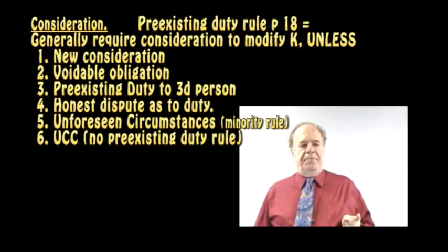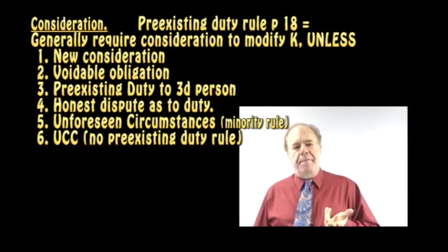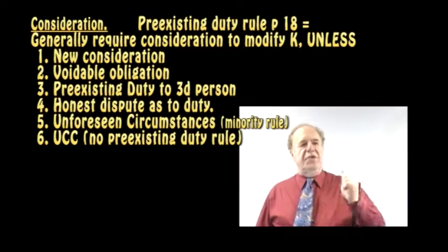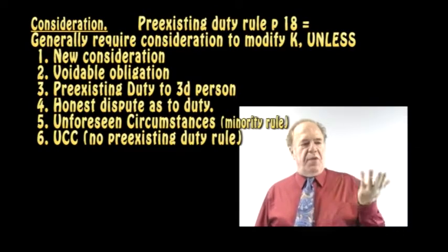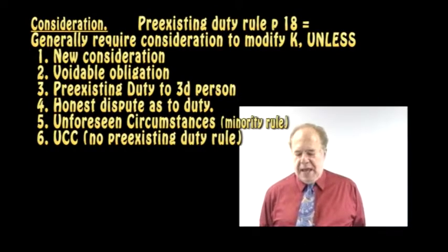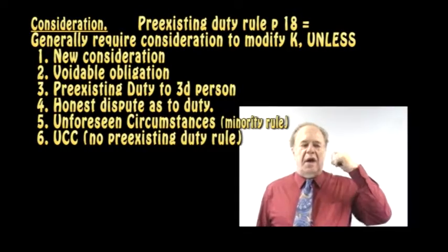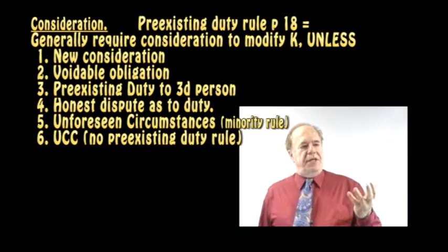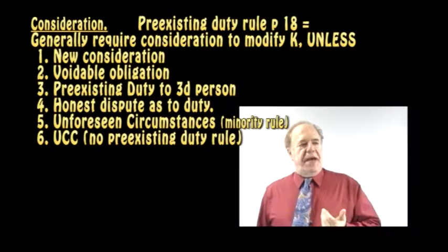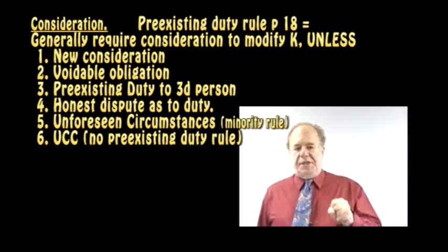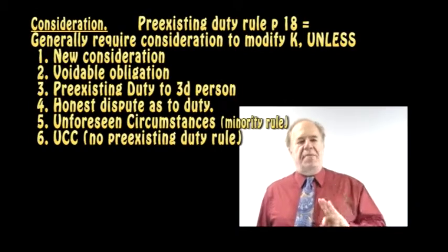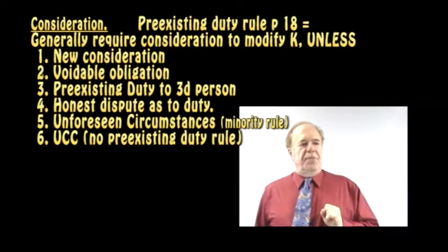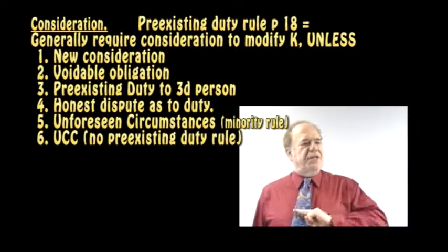Exceptions, loads of them. If there's a dispute about the duty, for example, if the duty is in dispute, then the settlement of the dispute can be the consideration. I say, yes, I know we had a contract for me to paint your house for $5,000, but we're having a dispute as to whether the painting was to be done in a certain way. We're having this dispute, and I say, okay, well, I'll do it, but you have to pay me extra. We had a dispute. The settlement of the dispute would be the consideration, even though I'm not doing anything that I might not have originally been obliged to do. Study the exceptions. You will be tested on the exceptions, at least 1 or 2 questions every exam.